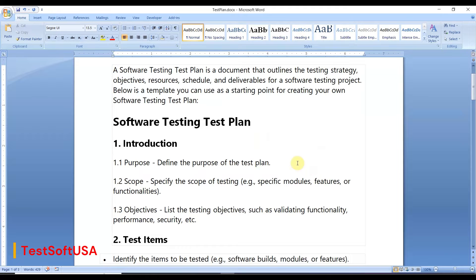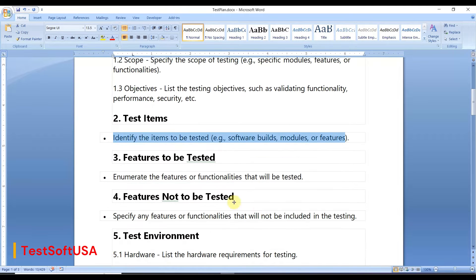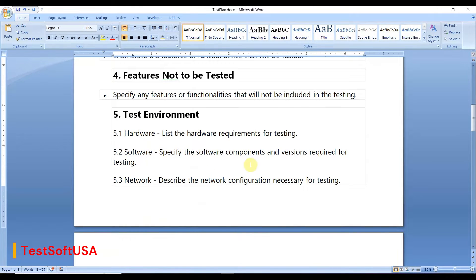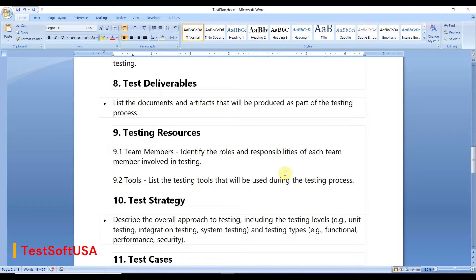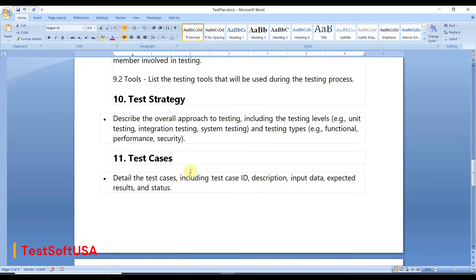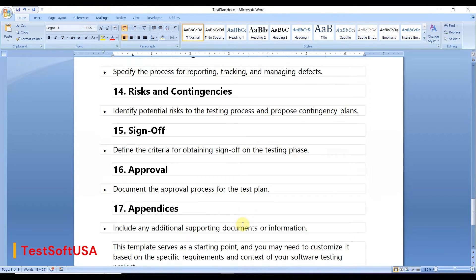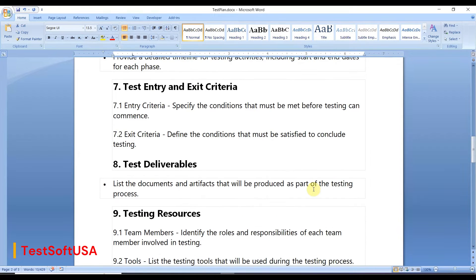Let me see the outline. Introduction — correct, we need to introduce our software testing in a test plan. Test items — identify items to be tested, software builds, modules based on the project. Features to be tested — correct. Features not to be tested — correct. Test environment including network, software, hardware — correct. Test schedule, entry and exit criteria — very important for a test plan. Test deliverables, testing resources, test strategy, test cases, test execution, defect tracking, risk and contingency plan, sign-off, approval, and appendix.